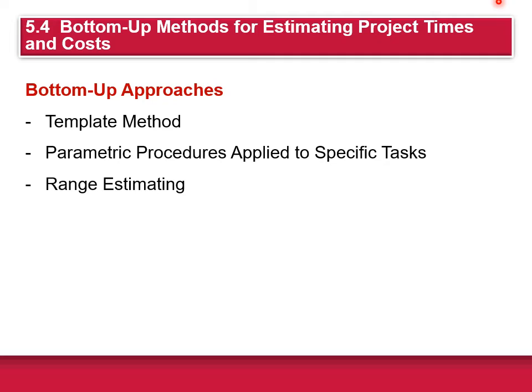He knows that the wallpaper itself costs $5 per square yard, and he can install it for $2 per square yard. So that's a total cost of $7 per square yard. So if you measure the length and height of all the walls, you can calculate the cost simply by multiplying that square footage by 7. So it's easy to do that.